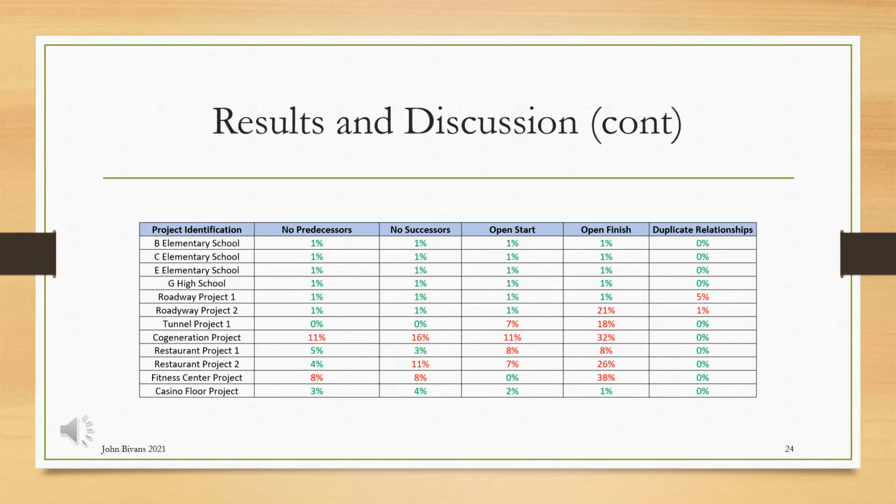In reference to the no successors metric, 3 projects failed to meet this threshold. An activity without a successor is a good indication that the activity can be extended to infinity without any impact on the schedule. Thus, every activity should have a successor. Of the 3 projects that failed this metric, the average delay was 33.3 days.